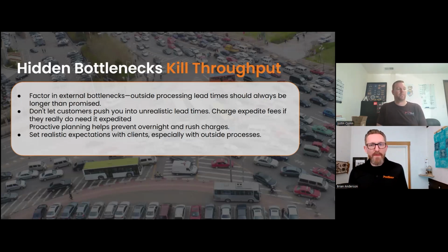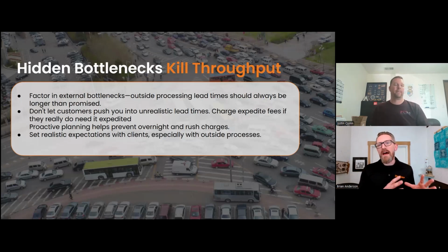What I mean by that is, if I continue to use the CMM as an example, say the CMM takes an average of 3 days to get a project through, and we understand that most projects actually only need to run through the CMM for say 2 or 3 hours, then we can start evaluating and say, does it make sense to invest in a secondary machine?